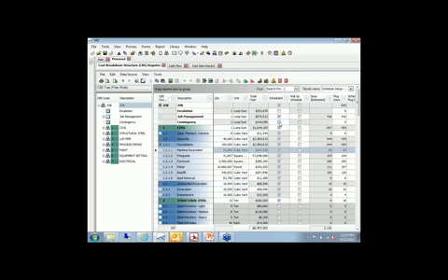So if it's something like a contingency, although it adds cost, it's not putting a bar into the schedule, so it's unchecked. As I mentioned, different roll-up options. Here's our estimated durations. We also have what we call a plug duration, so you can show different durations in the schedule than those durations around which you've based your costs, or they can be the same. A lot of different options. Many more than what I'm showing on the screen here in terms of how we control what goes back and forth between Primavera and hard dollar.